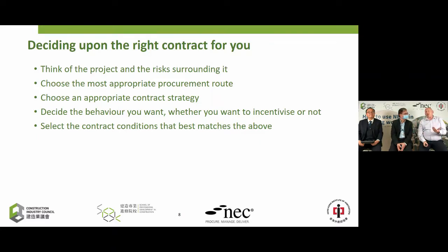Once you pick the appropriate contract strategy, decide the sort of behaviour you wish to have on your contract. Do you wish to incentivise the contractor? Do you wish to have an incentive in time, cost or quality? Or do you want to not incentivise, i.e. put things like delay damages, retention, or the like on the contractor?